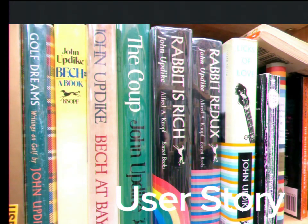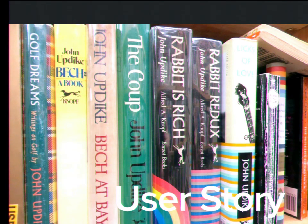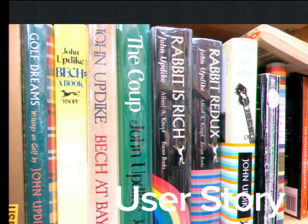User stories are a way to define experiences — for example, 'As an anonymous user, I want to log on to the site so I can post to a user forum.' I'll go through wireframes from our UX people and write user stories for each element I want a client to test. They're written so clients easily understand what we're going to build, and by the end of story writing, clients are often writing most of the stories themselves. We also use them with Behat for automated testing.